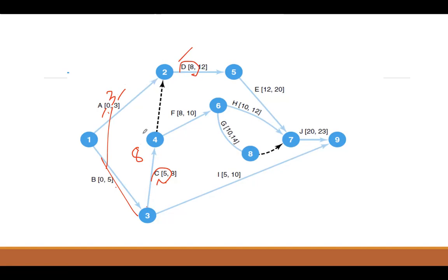But here you can see the case, for example, before activity D, B and C both should be complete and A should be complete. But C will complete at 8 weeks. So A can be started at a later time as well, so that the project is not delayed, right? Activity A is definitely very important because only then will all other activities start.